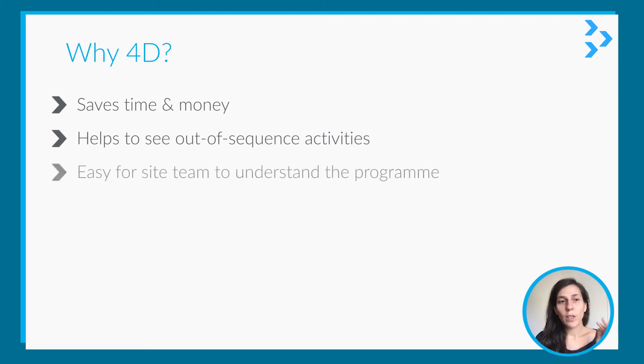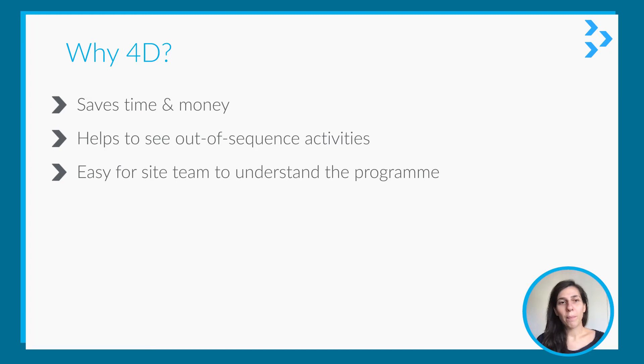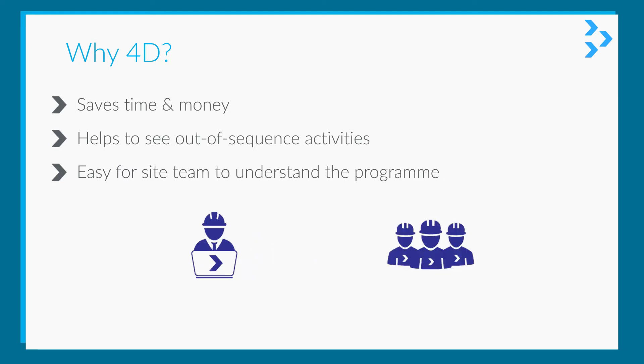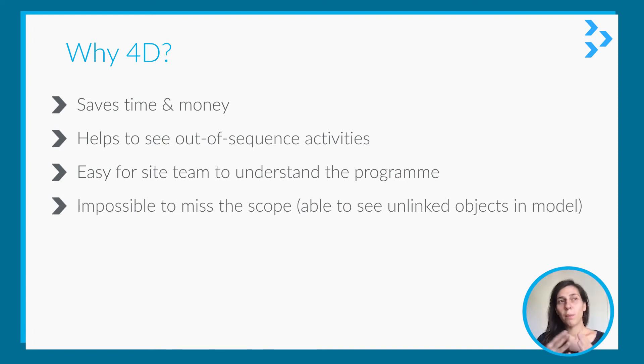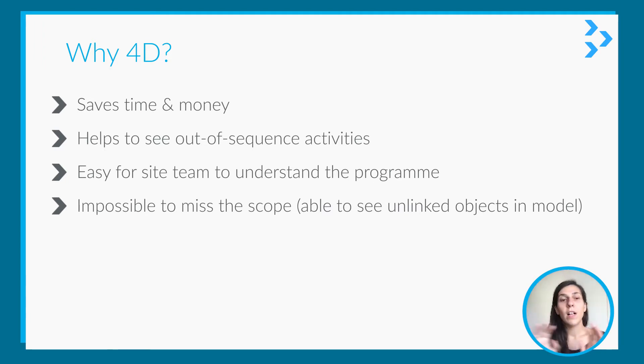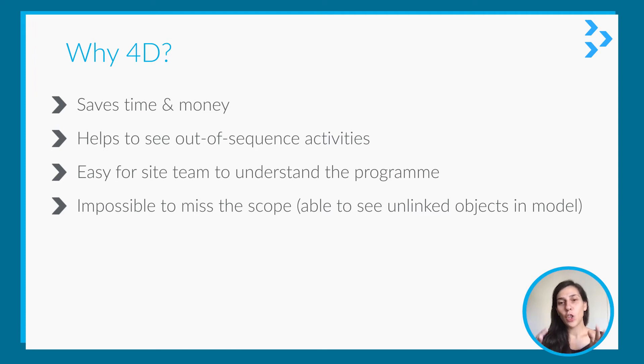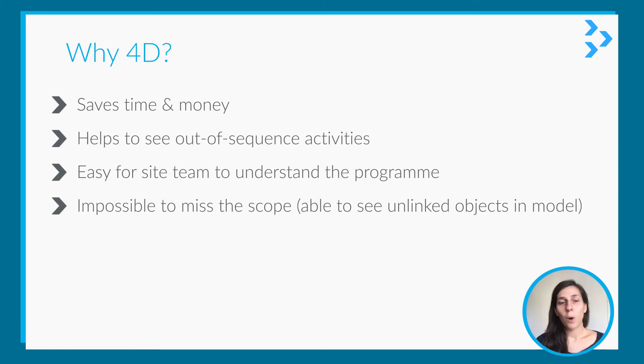And it's also easy for site team to understand the program, because when you submit like 10 pages or 20 pages of program, they usually don't want to go through it. But if they see the model and how the activities are ongoing, then it allows them to understand the sequence of works easily. And it's impossible to miss the scope—what you're building is what you have in the model. If you have all the activities to be done in the program and link them to the related objects in the model, then you know that you're not missing anything in the project. You have all the scope included in your program.